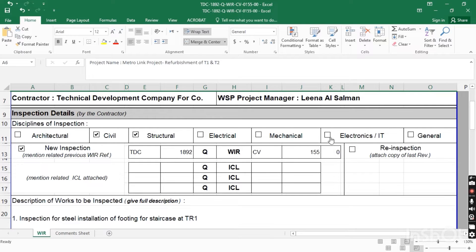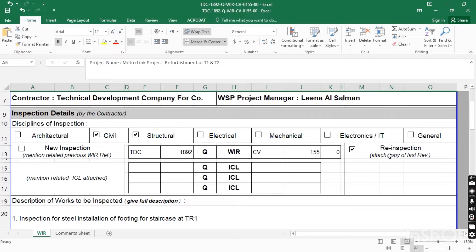For mechanical, click on mechanical. For electronics or IT, click on the respective field. If it is a general WIR for any general work, click on general. If this is a new inspection request, click on 'New Inspection Request'. But if you are resubmitting — for example if the work was rejected — click on 'Re-inspection' and uncheck 'New Inspection'. When resubmitting a WIR revision, you must attach a copy of the previously rejected WIR.